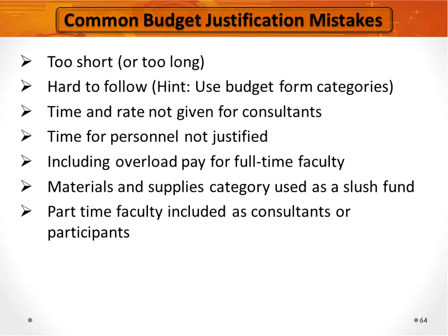One other point to make would be, and people haven't been doing this as much as they used to, if you are requesting equipment, go ahead and put down whether or not you've asked for an educational discount from a company. It used to be that people would say, we've checked out 3 different sources for this piece of equipment. Maybe it's an atomic force microscope or something. This is the company that has provided us the best educational discount, and this is what we plan to go forward with. Doesn't mean that your quote might not have expired by the time you actually hear you have the award, but it shows the reviewers that you are thinking carefully about your budget.